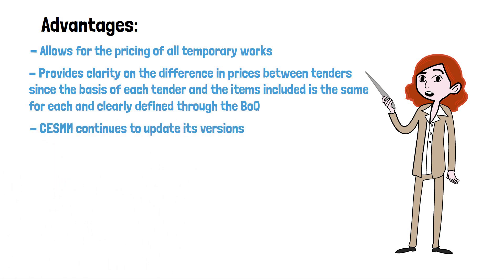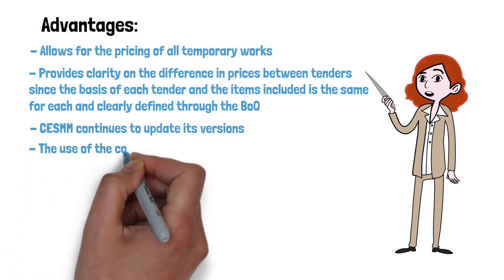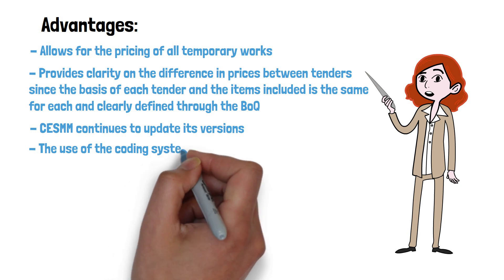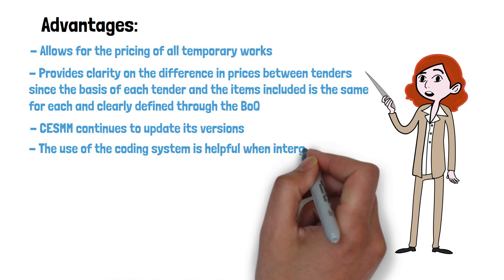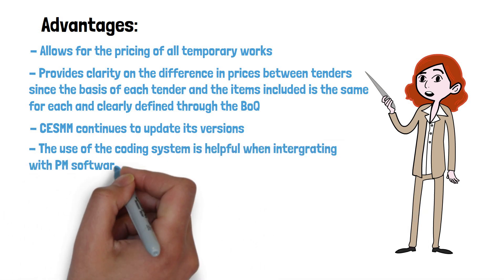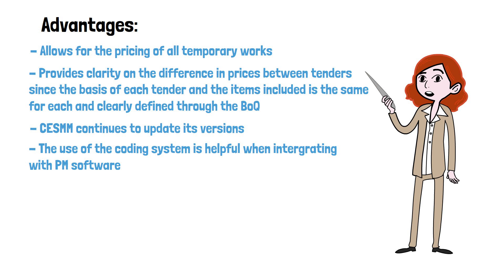CESMM continues to update its versions to accommodate new technologies that appear in the world of civil engineering. The use of the coding system to identify separate category items can be very helpful when integrating CESMM into project management software. The coding system also allows CESMM to include extra work items not mentioned in a certain category by making coding iterations.